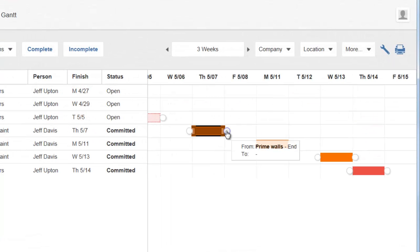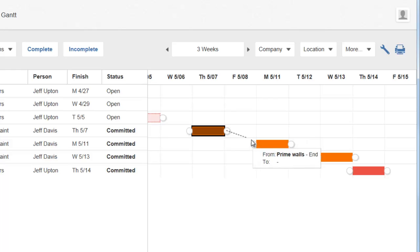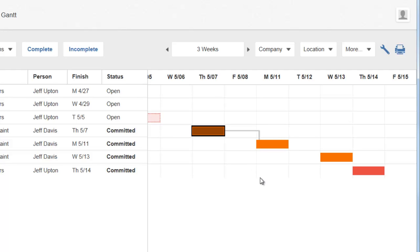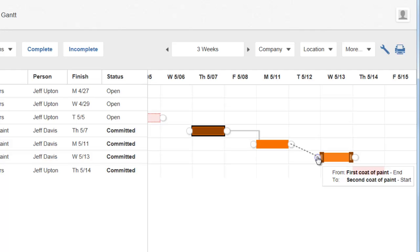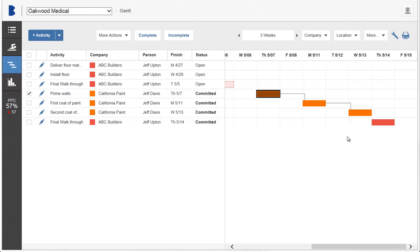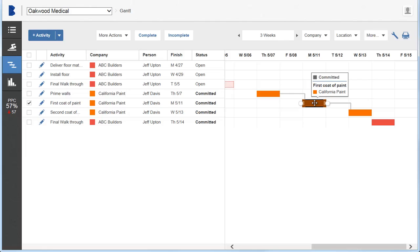To create a handoff link, hover over the end of a task to display a white circle, then click and drag to the beginning of the task to link to. Note that dependencies also display in the activity dialog. Double-click an activity to see all of the activity information.